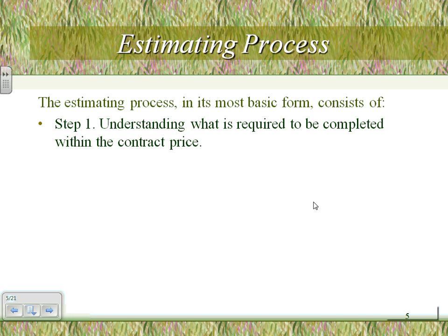I almost got fired when the boss came. He said, Chad, we're bidding it to code. What does the code say? One switch, one light. We're not bidding it for the perfect installation. So you're gonna be very careful when you do things: what's included in the contract price, what you're paid for. You don't want to be a jerk with the customer, but you really have to watch out, especially on small jobs.